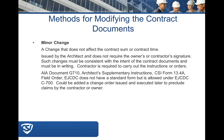CSI form 13.4A, Field Order, is a similar document. The EJCDC doesn't have a standard form for this, but the C700 would be the appropriate form to use for issuing supplemental instructions under their contract documents.